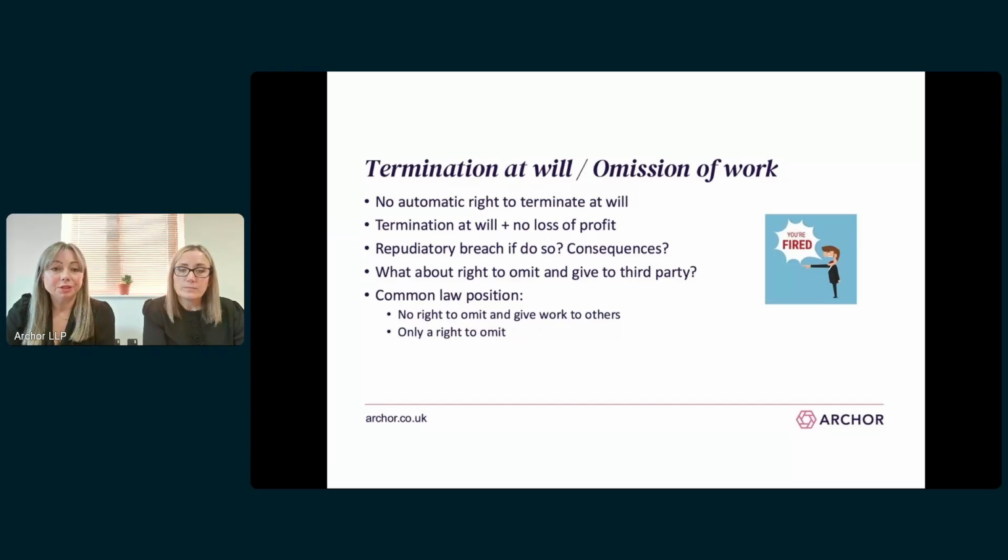It is really important to note, though, that if there is no clause allowing the employer to terminate at will, but the employer does so anyway, this will be a repudiatory breach of the contract on the employer's part. An employer cannot terminate at will unless there is an express right for the employer to do so. If the employer does take such action, the contractor will likely be able to claim all losses flowing from that breach.